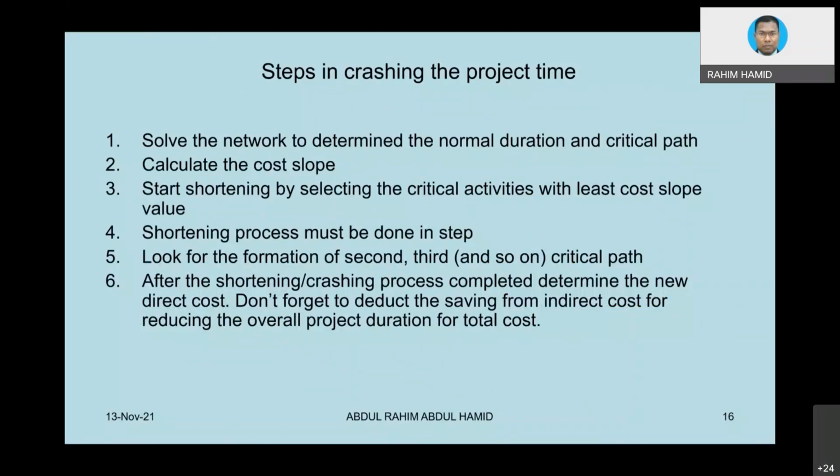Steps in project crashing. First thing, solve the network diagram. Again, you have to solve the network diagram using AOA, AON or PDM diagram. As I mentioned to you, this topic is an example of the application of planning and scheduling. Number 2, calculate the cost slope based on the given information. Or if you are well versed with planning, perhaps you can understand that certain activities you can do normally, but you can expedite a little bit, though there is extra cost.